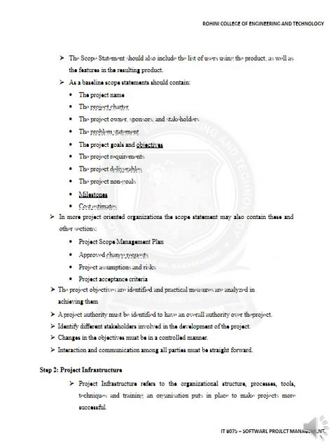In the baseline of the scope statement: project name, project charter, then owner, sponsor and stakeholders. What is the problem statement for the project? What are the goals and objectives? What are the requirements to do the project? What are the deliverables the project will produce? What are the non-goals? What are the milestones to achieve? What is the cost estimate of the project?